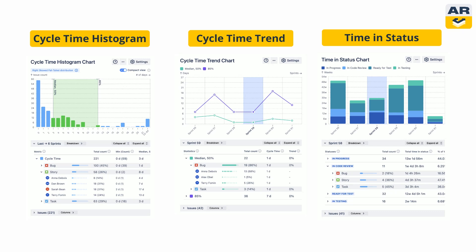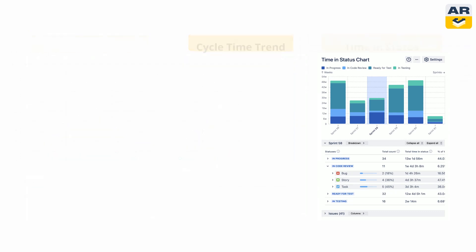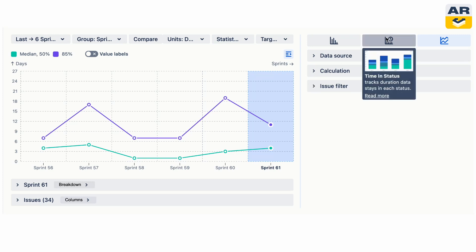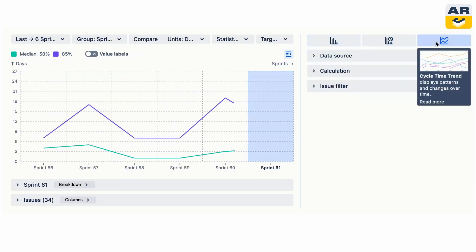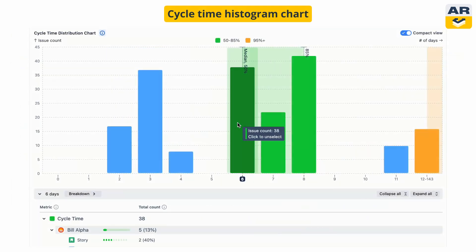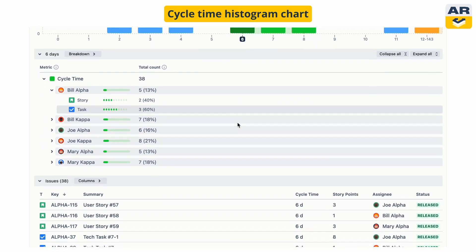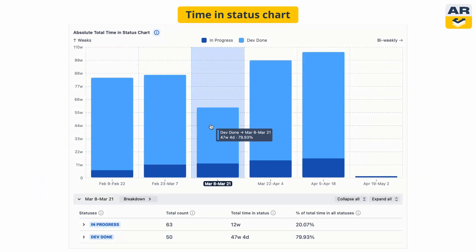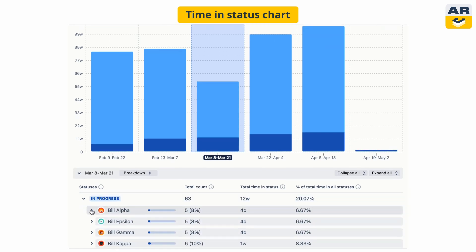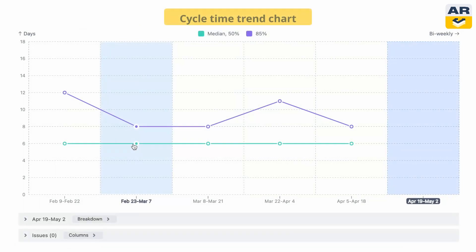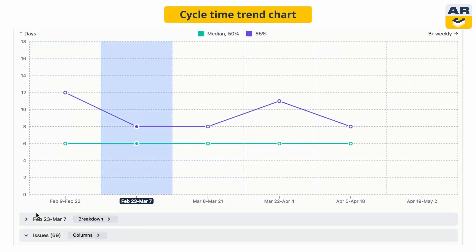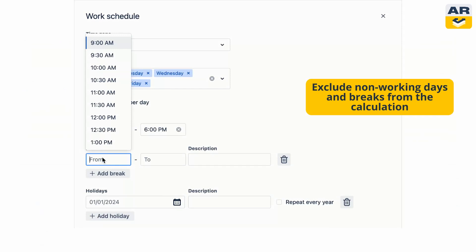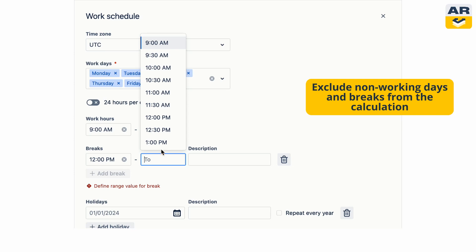And last but not least, the cycle time chart gadget. Set up your data source and calculations, and simply switch between histogram, trend, and time-and-status views to see your cycle time data from different angles. The cycle time histogram chart shows you how issues are distributed across time frames and statuses, with an actual timer for more accuracy. The time and status view reveals where tasks might be getting stuck. And the trend chart helps you spot performance patterns and make solid SLA predictions. To each chart, you can add a granular working schedule to make sure breaks and holidays are excluded.